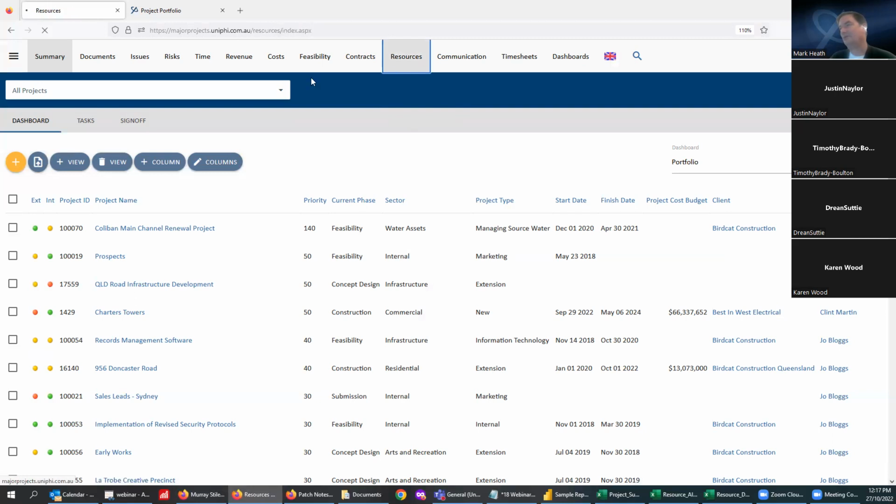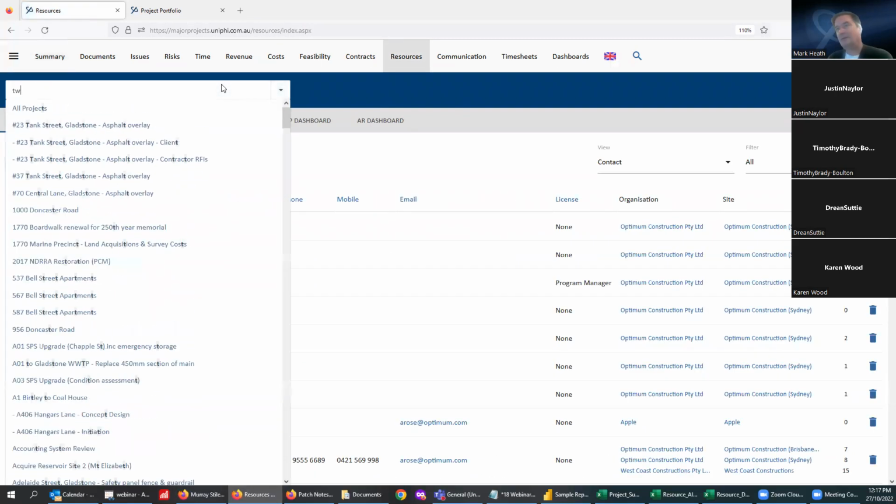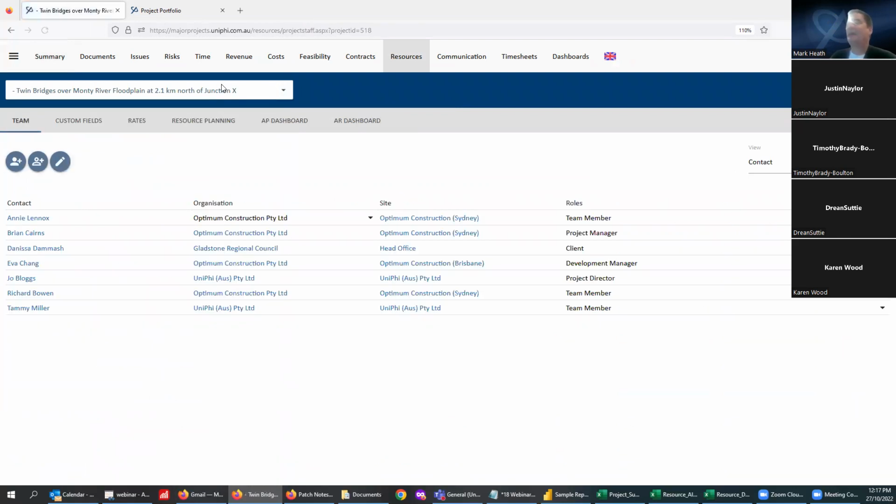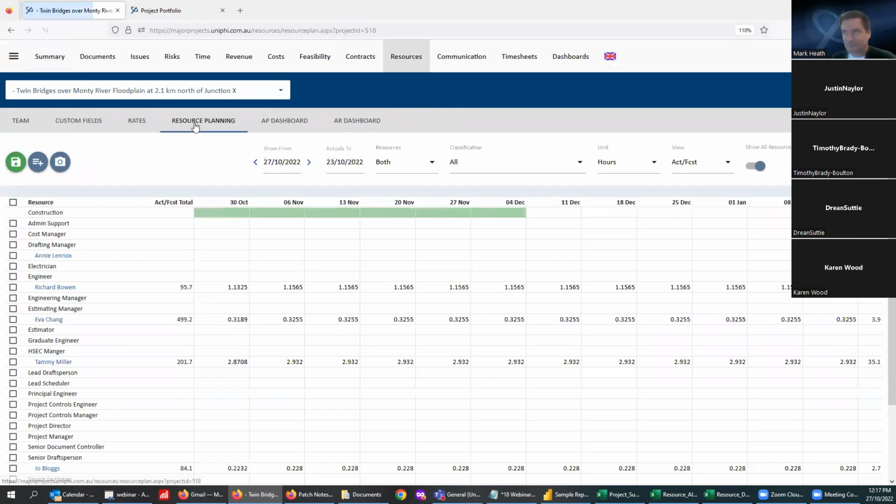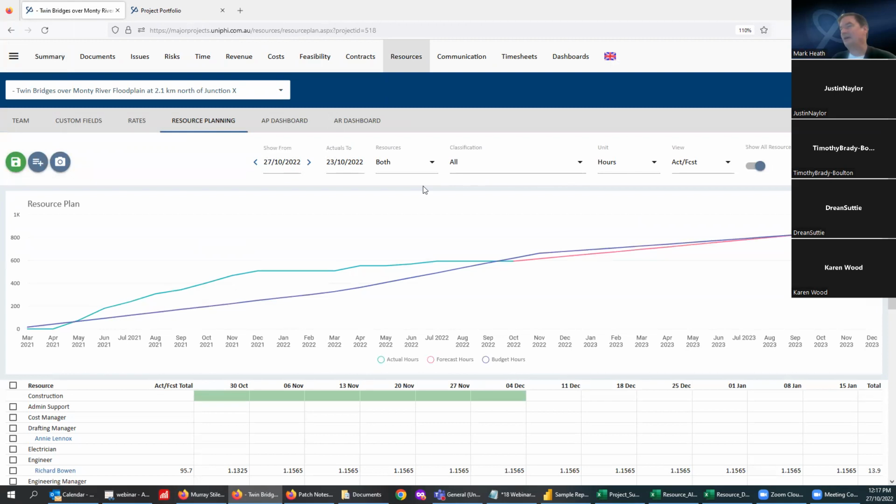We go to the resource plan module. I'm just going to go into a project, and you'll see there's a resource plan sub-navigation. So I'm in the resources module, resource planning subnav. That's been there for a while. And what you'll see is the ability to resource plan at either a classification level or a person level. And you can capture both a baseline or an actual forecast. So timesheet data comes in dynamically, and then remaining forecast or budget, and you can compare both in this screen.